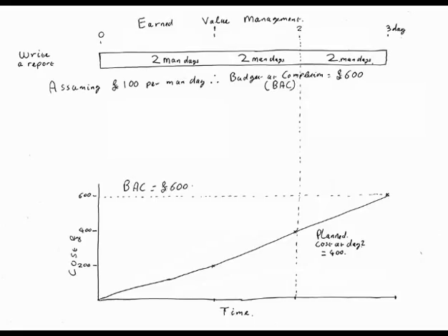So I can now draw the planned cost, which is a curve, which shows how much I'm going to spend each day, cumulatively. People get confused when you use the word curve because in this case it's going to be a straight line. On a real project, it would look like a curve, usually like a hockey stick. But in this case, it would just go up like that, a straight line at 45 degrees, showing planned expenditure.